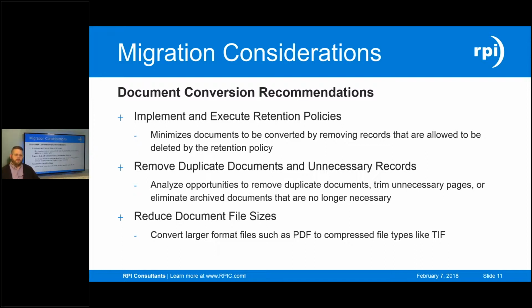You don't have any retention policies, and documents are building up in your system that you do not need to store anymore. Retention policies can be used to move documents to cheaper storage or delete them entirely if you no longer need to retain them. This is going to trim the fat, so to speak, so you have fewer documents to move to the target system.